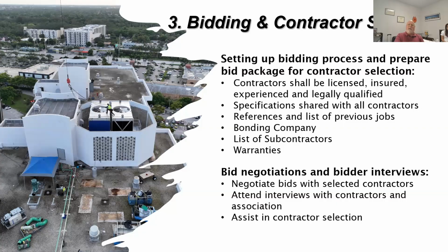And with that handful, you do a bid review and scope review and go through and make sure that you have a full understanding of what's included, what's excluded, and making sure that if the contractor excludes something, the association is able to figure out a way to make sure that if it's necessary, it actually happens. And then finally, after you have all of that, you're able to let those contractors go back. If there's something they took an exception to that's mandatory, maybe they'll add money into their bid for that.